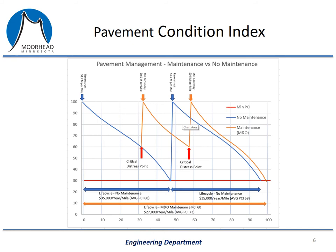Across the bottom of the graph are several blue and orange arrows representing the life cycles of the roads. These arrows show that a road with mill and overlay maintenance actually extends the life of the road — meaning it's a longer period of time before we need to reconstruct it. Not only do we extend the life of the road, but based on data from past projects, we know that we will spend less money maintaining our roads this way, and the condition will be maintained at a higher level. The average PCI of a road with no maintenance is 68, while the average PCI of a road with mill and overlay maintenance is 73 — meaning it's a nicer road and a smoother ride.